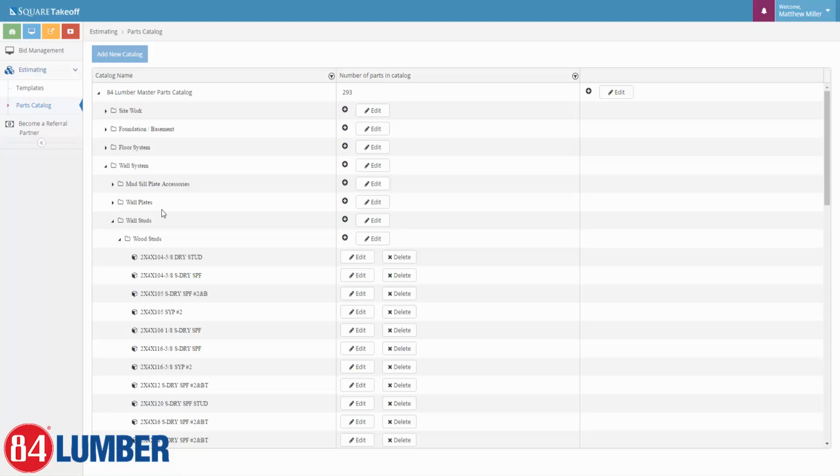So for example, if we were looking at roof sheathing, the measurement value would be an area of roof sheathing, and we would want to calculate out the amount of sheets based off of that. So 7/16, maybe 15 or 30 pound felt. Maybe we even want to throw shingles on top of that. So that would be those components that would make up that scenario or that template.